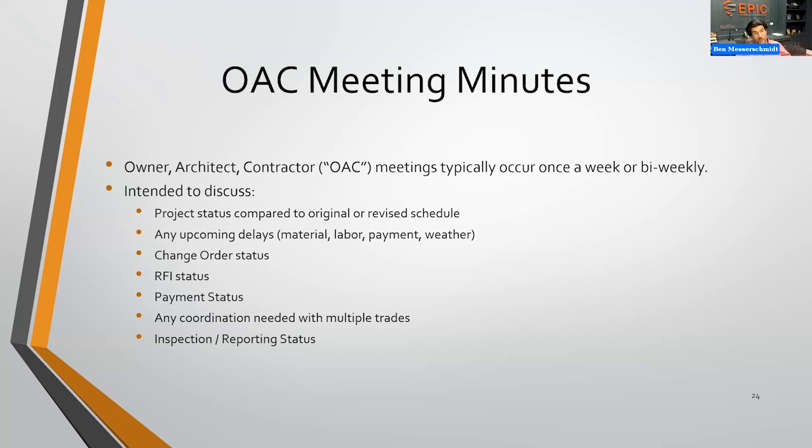Where is the construction going to move next? Do you need to go ahead and notify the building? Do you need to notify the owners in there to get things off their balcony, close their balconies? They can't use a certain space, what have you. Talking about it on the front end is going to be paramount, so that plans can be put in place and executed so that this minimizes the overall impact to everyone involved.